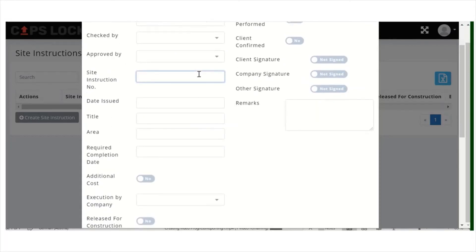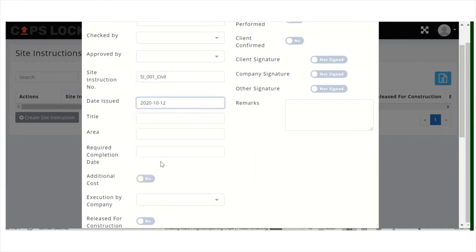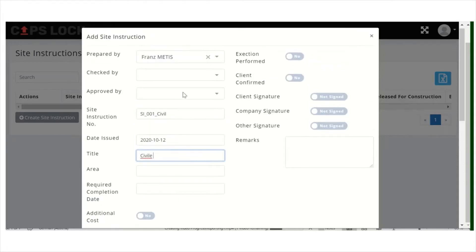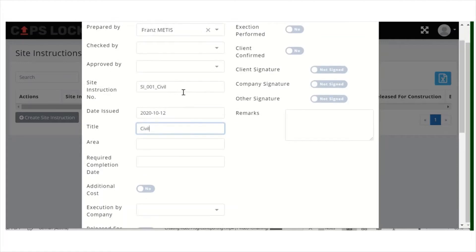You have to give a site instruction number — for example 001 — and the date when you issued it. Then you provide a title, for example: Civil Foundation Drawing A.